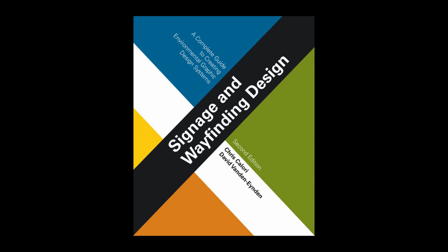Therefore, the EG designer's role during the bidding phase can be described as advisory. After the designer releases the document package to the client's contract representative, it's that representative's responsibility to compile and assemble the overall bid document package, issue the documents for bidding, administer the bid process, evaluate the bids, and award the fabrication contract. Unfortunately, contract reps sometimes leave the EG designer out of the bidding loop.